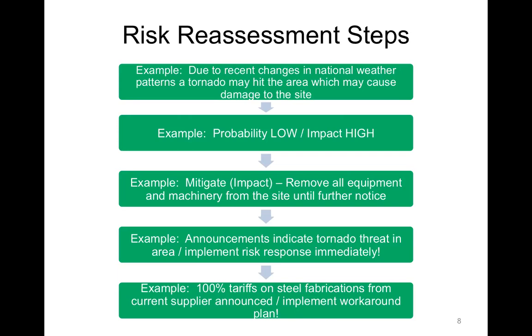The reason for this is because the project manager can't be held to those risks. It's not fair to the project manager to have to bear that responsibility. So the project manager can use management reserves, which are under the control of senior management, usually a sponsor. If the project manager is given authorization to use management reserves to pay for the workaround plan, then the workaround plan can be used to react to these unknown risks, and the money will not come out of the contingency fund.